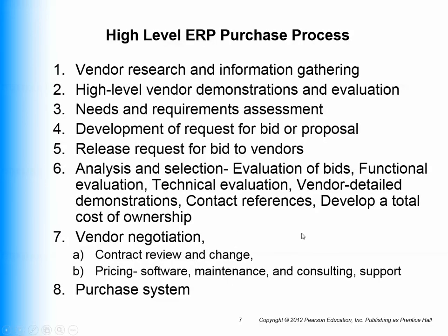And here's the process that you typically use. You research vendors because you're going to have to acquire your ERP system through vendors. You're going to ask those vendors for demonstrations, and you need to evaluate them. And here's the rub. Many vendors come in and show you their wares, but you can't really know what you're getting until you exercise it. You look at your needs, your requirements assessment. You may put out a detailed statement of your needs in terms of a request for a bid or a request for proposal.